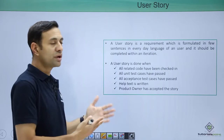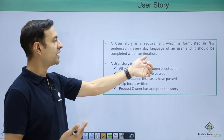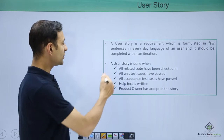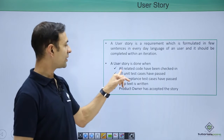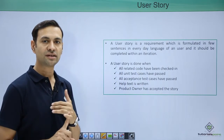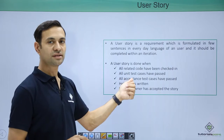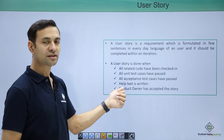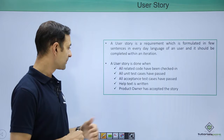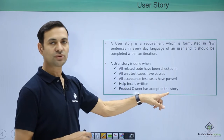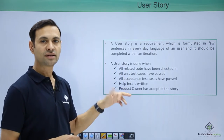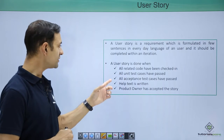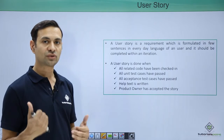So what is done all about? A user story is a requirement formulated in the everyday language of a user, and it should be completed with an annotation. The definition of done for a user story is when all relevant code has been checked in, all unit test cases have passed, all acceptance test cases have passed, help text like release notes is written, and the product owner has accepted the user story.